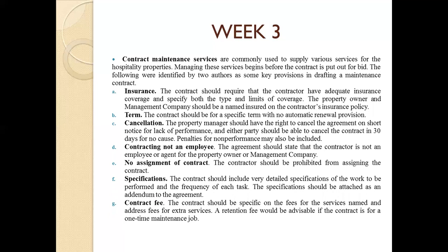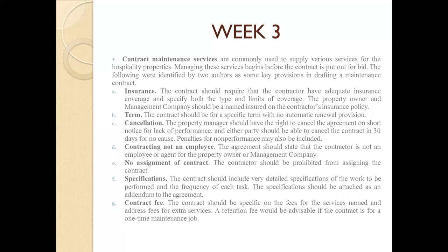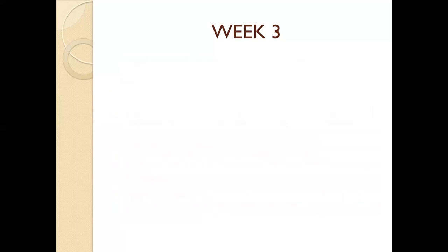Contract fee. The contract should be specific on the fees for the service named and address fees for extra service. Retention fee would be advisable if the contract is for a one-time maintenance job. So, dapat naka-indicate doon kung magkano yung babayaran. Kasi minsan, di ba, pabago-bago yung presyo nila. Pag alam nilang importante, babaguhin nila.